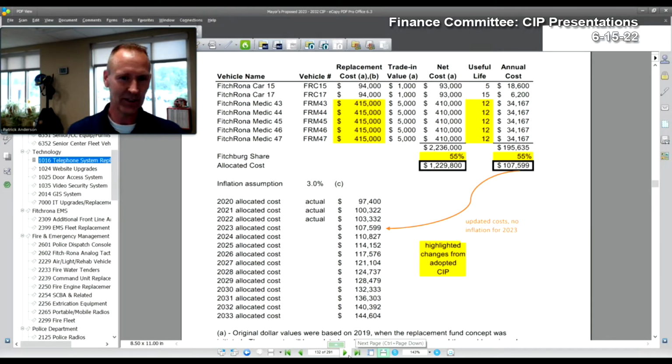So if we start stretching out the life of a vehicle and we make them last, we're probably going to run into other issues of having to replace cots, which, when I first started this, were $10,000 a cot. Today it's $23,000, and that's probably going to go up another 15 to 20% coming up. So it's entirely possible that over time we're going to have to start creating more replacement programs if we don't replace everything with the truck. It's something I look at. There are always options on the table about how we keep this cost down, but we are about to stretch it out to 3 years and see what happens.